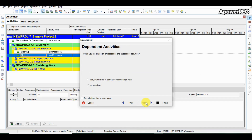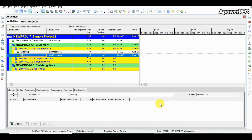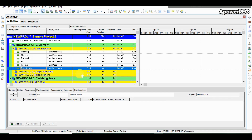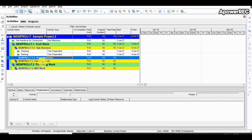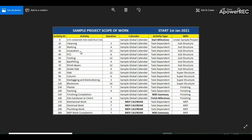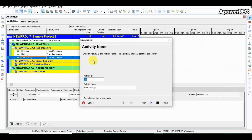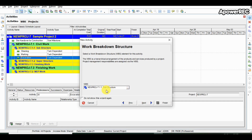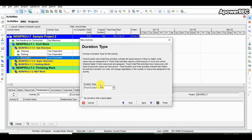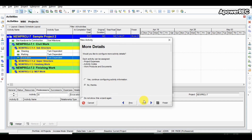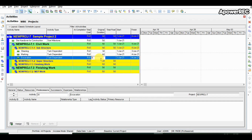The relationship details we will define once we define all the activities and the full scope. After marking, the next activity is excavation, which has a 12-day duration. We will define the new activity by clicking on the add activity symbol and rename it as excavation. The ID is automatically taken by Primavera with an increment of 10. By default task dependent is selected; other details are not required for now. We notice that again and again we are getting details not required, making the entire process lengthier. We want to feed data in Primavera in a faster way.